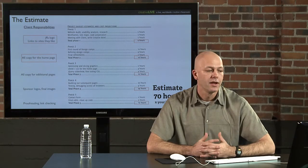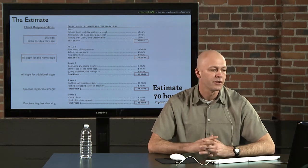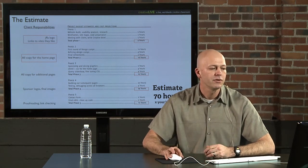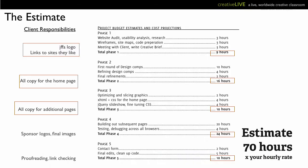Okay. And I want the client to have all the copy to me by a certain point if I'm going to start building. I don't really need it in phase 2, but I'm certainly going to need it by phase 3. But at this point, I'm asking for the things that are a week out. I want the copy for the additional pages, which we don't have yet, but which we're going to have to drill down on. Usually the images, particularly for a site like this, where we're talking about bands and musicians. You know what it's like trying to get a photo out of a band? It's going to take longer than you think. You know what it's like getting a logo from a sponsor? It's going to take longer than you think.